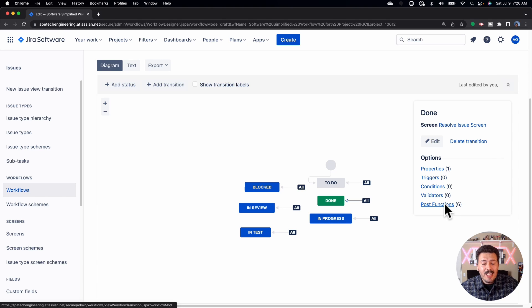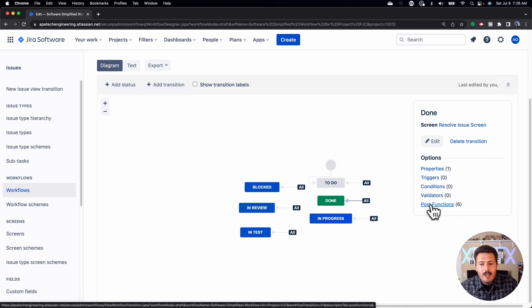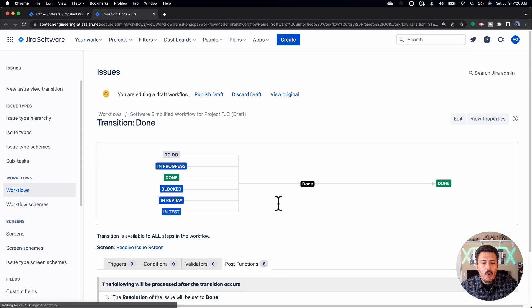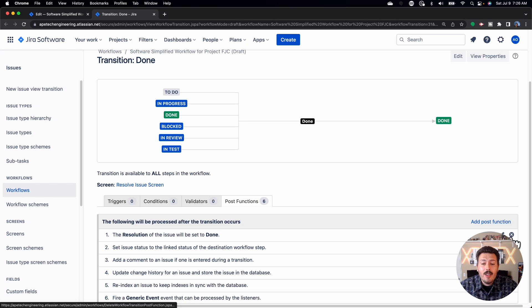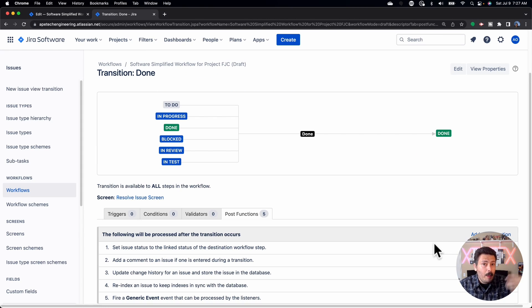If your post function number is 6 or higher, you want to go in and check it. Let's open up the post function. You'll see that I have 'Resolution is set to Done' — what this means is that any time I move an issue to done, it will override the resolution to just be Done. I don't want that because I just added the ability to select the resolution I want. If you have that, click the little X to get rid of it, because now we're going to be proactive in selecting our resolution. Without this post function, though, the issue will never get resolved and it'll always stay open.